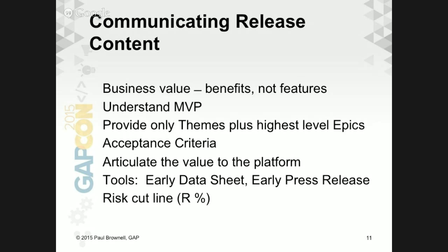It's usually not a very clear answer, but you usually have an idea of that. And the best test that I have for answering this question is when you look at the product and you say, okay, if today I'm supposed to release in October, if it's October right now, and I had to release the product, which of these things could I live without?